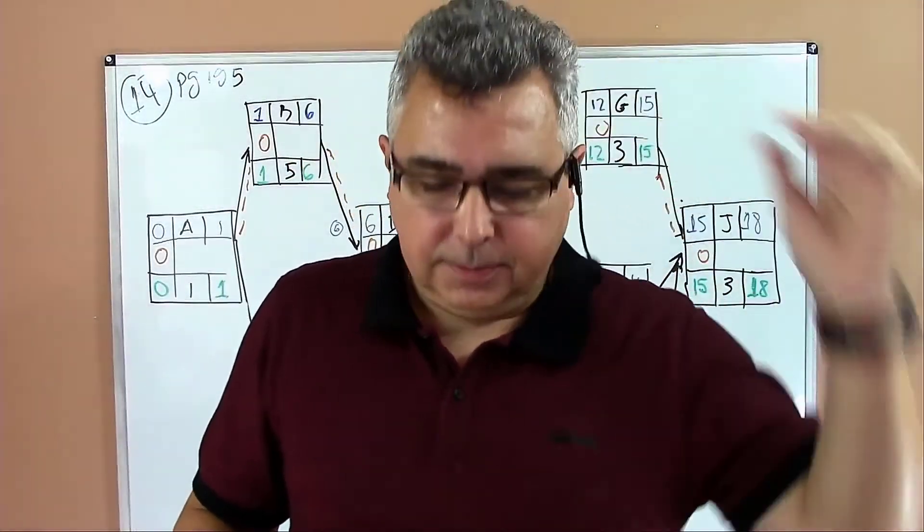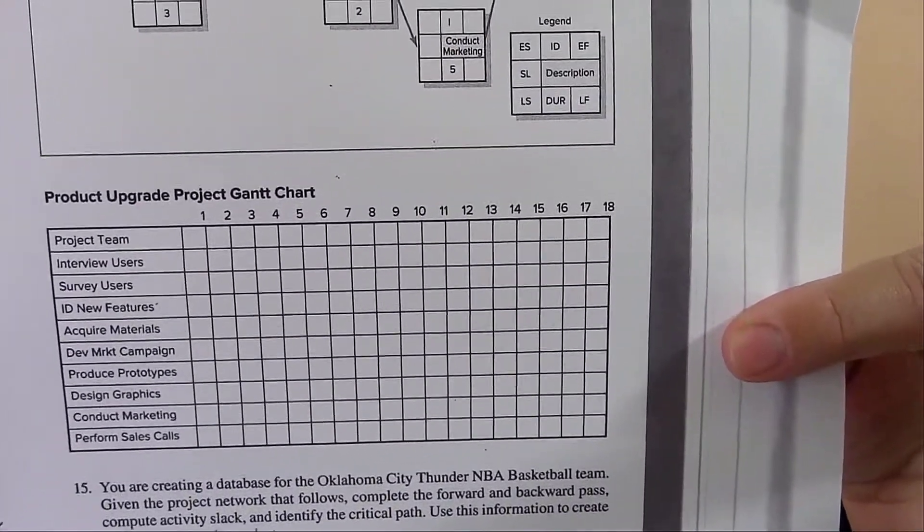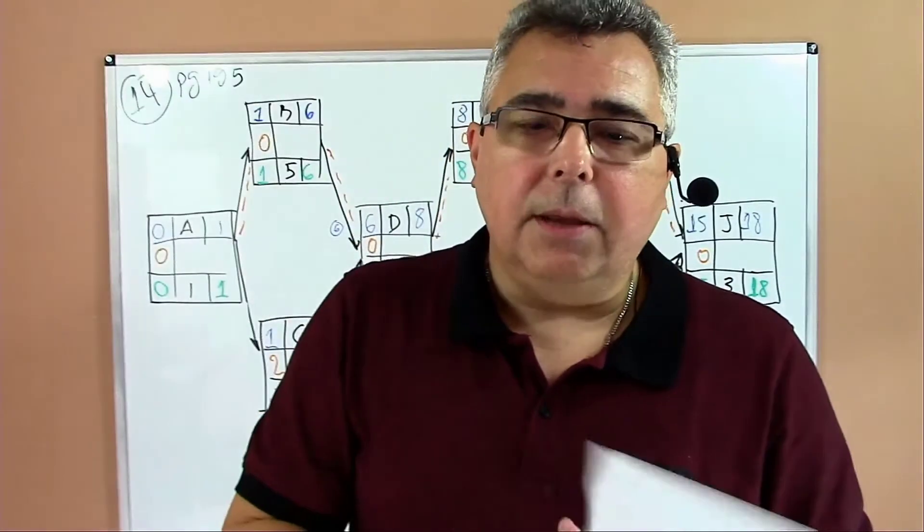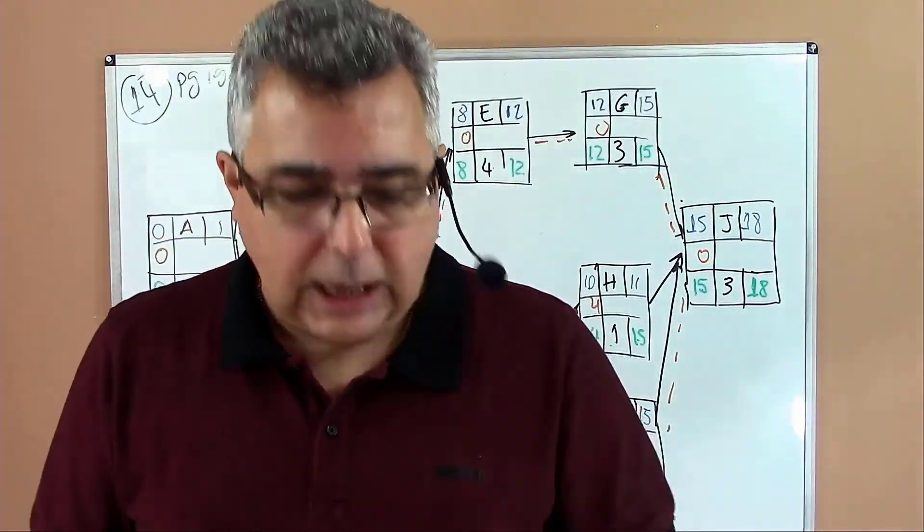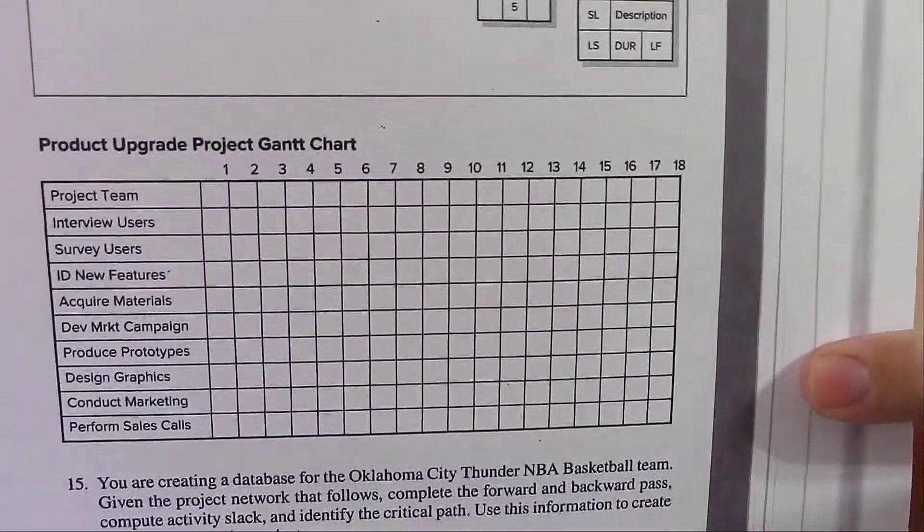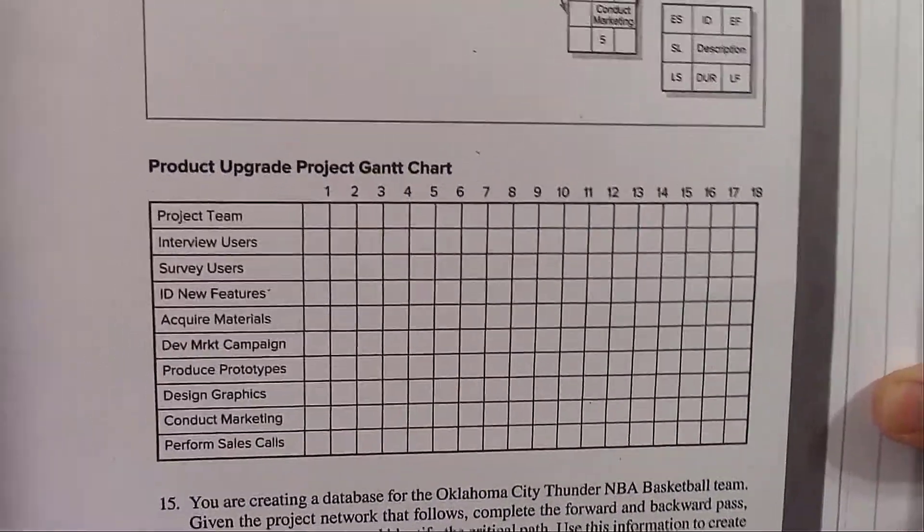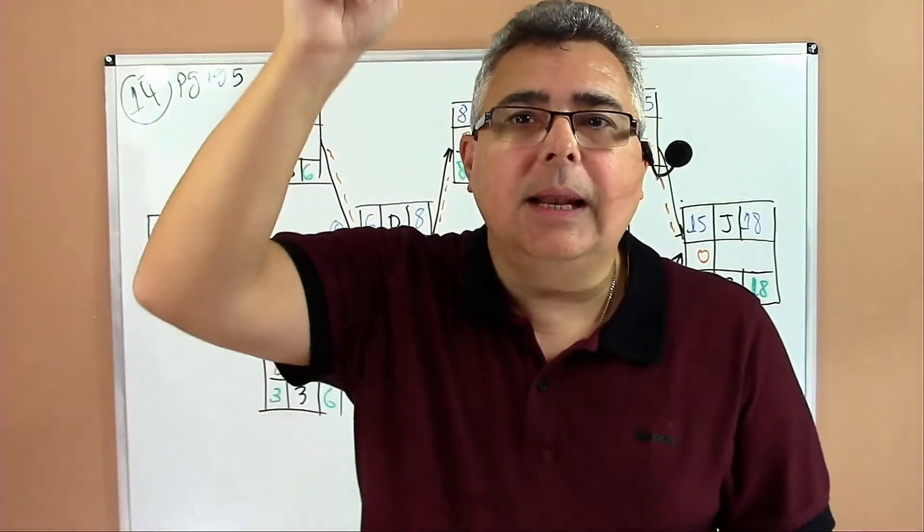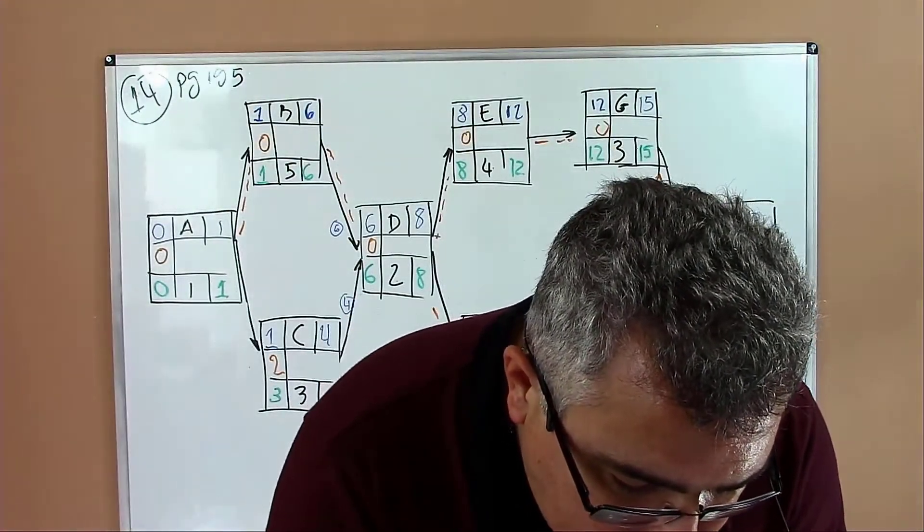In the book you have a table like this. Can you see? We'll be drawing the Gantt chart on the table. First thing that's very important to realize: the numbers are on the top of the line, not in the middle of the square. Can you see that? That's very important. We have to put the lines on the top and we need to start on the top of the line, not in the middle of the square.